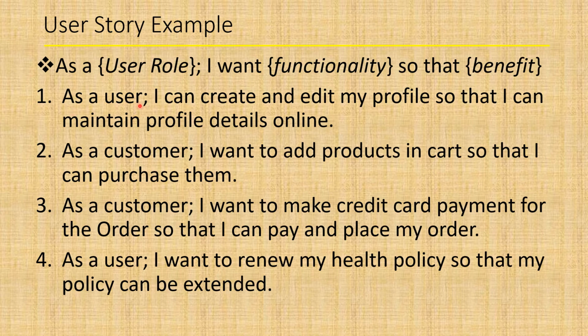As a user, I can create and edit my profile so that I can maintain profile details online. This user story is talking about a user who wants to create a profile in an application, and who wants to edit a profile in the application. So this is how we have written it: as a user role, what exactly we want to do, so that we achieve some value.